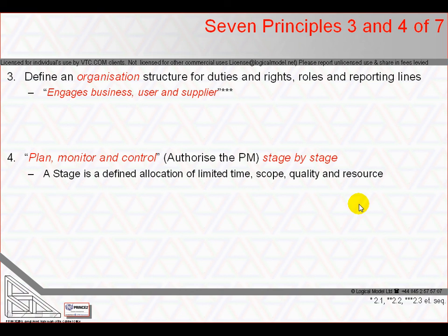The use of stages enables creation and occasional refresh of a long-term outline project plan, plus creation of short-term detailed stage and team plans. Tiered plans avoid wasting effort on attempts to plan in detail that is beyond a sensible planning horizon. Each tier of plans matches a level of detail and duration that is manageable and foreseeable and appropriate to a level of management within the organisation.